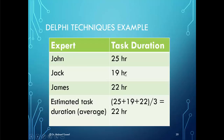This slide shows an example using the Delphi technique. We have three experts — John, Jack, and James — and we have the task duration based on each expert's opinion. To estimate the duration, we calculate the average, which is the sum of all task durations divided by the number of experts, which is three, giving an average of 22 hours.